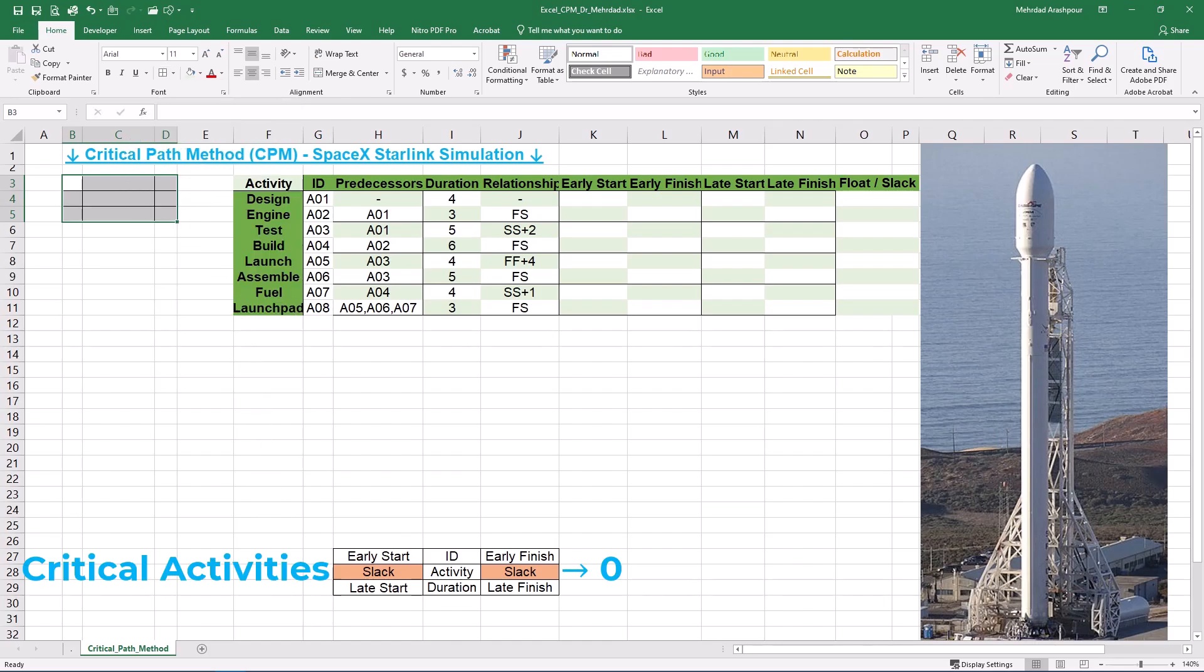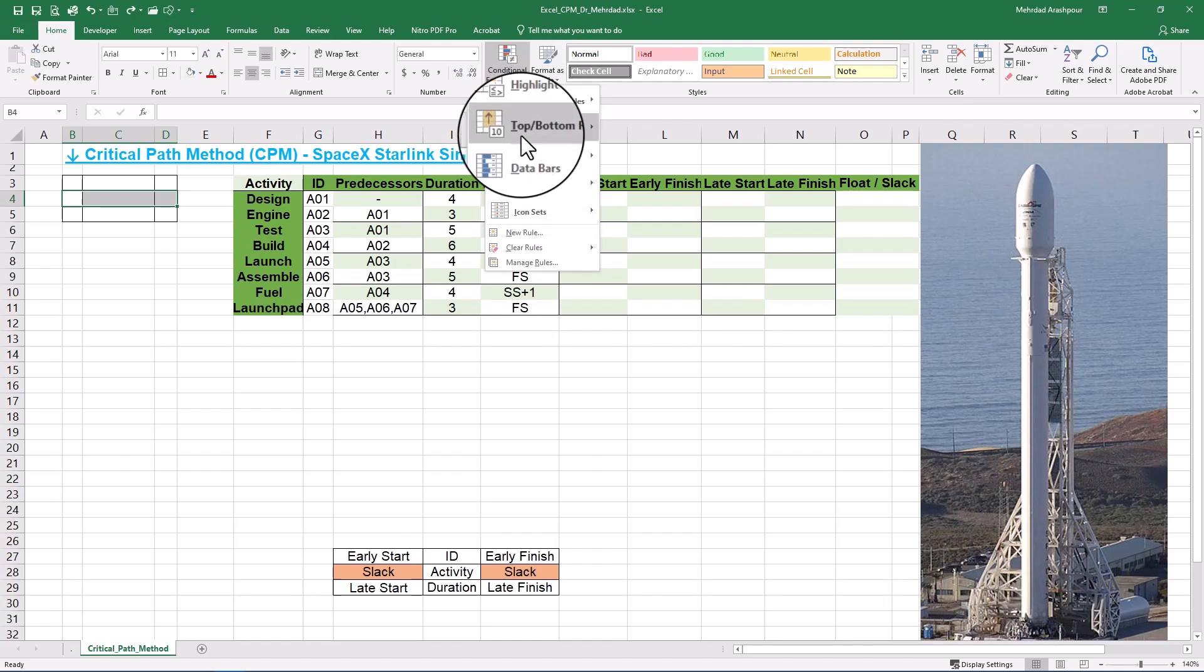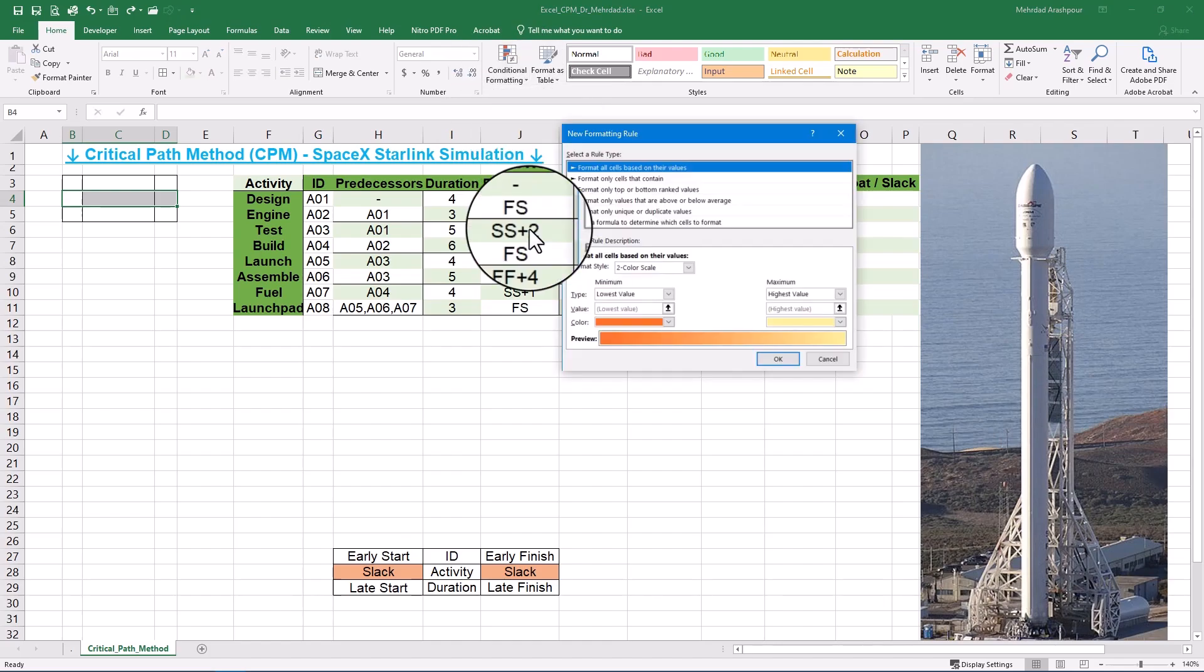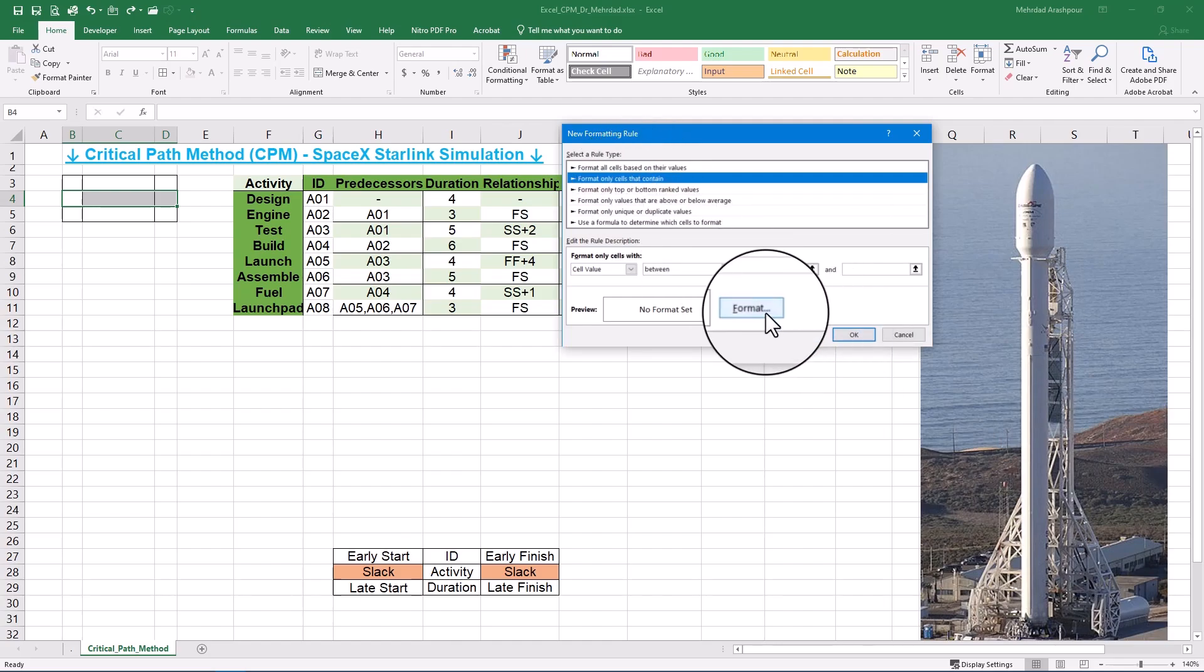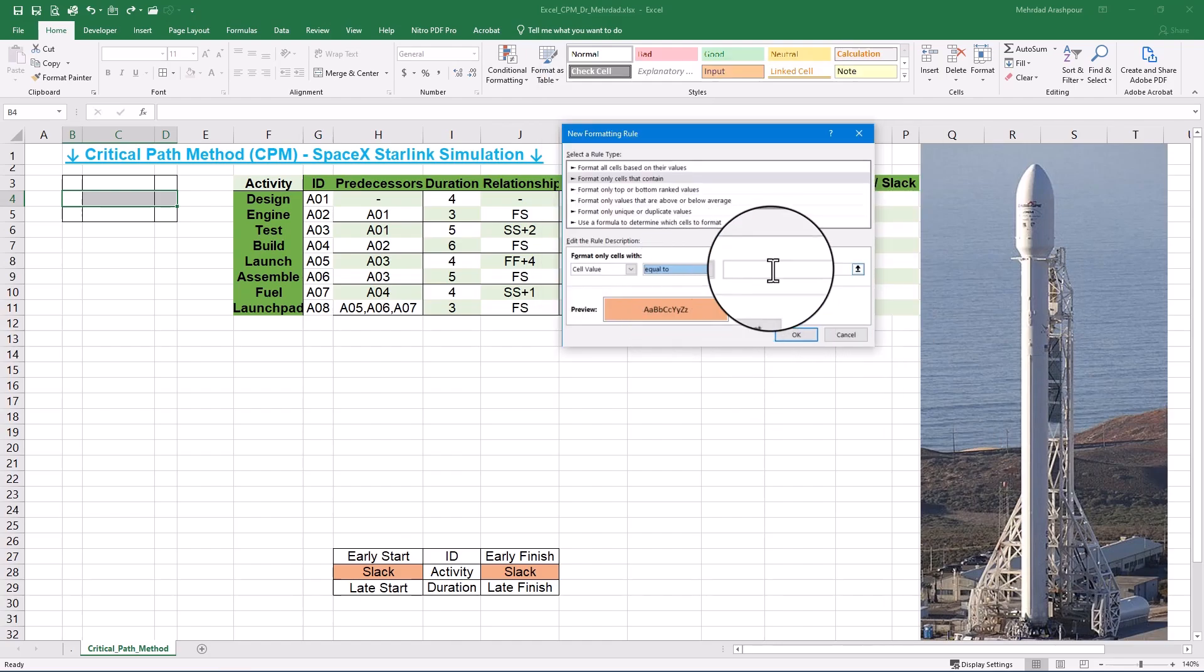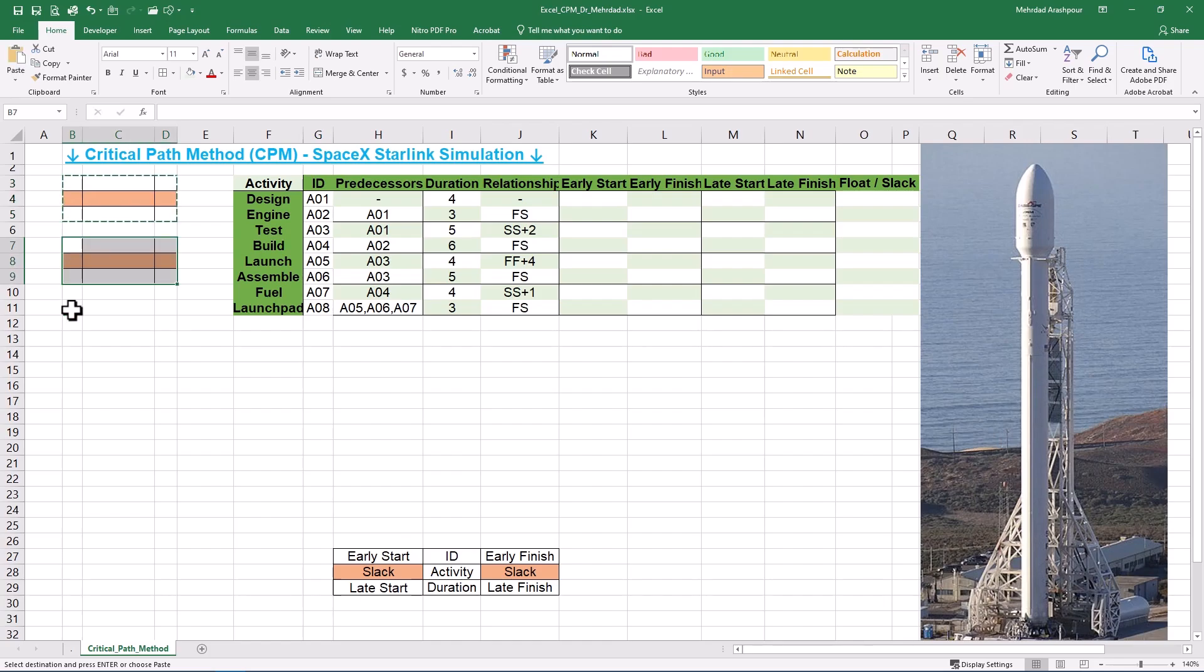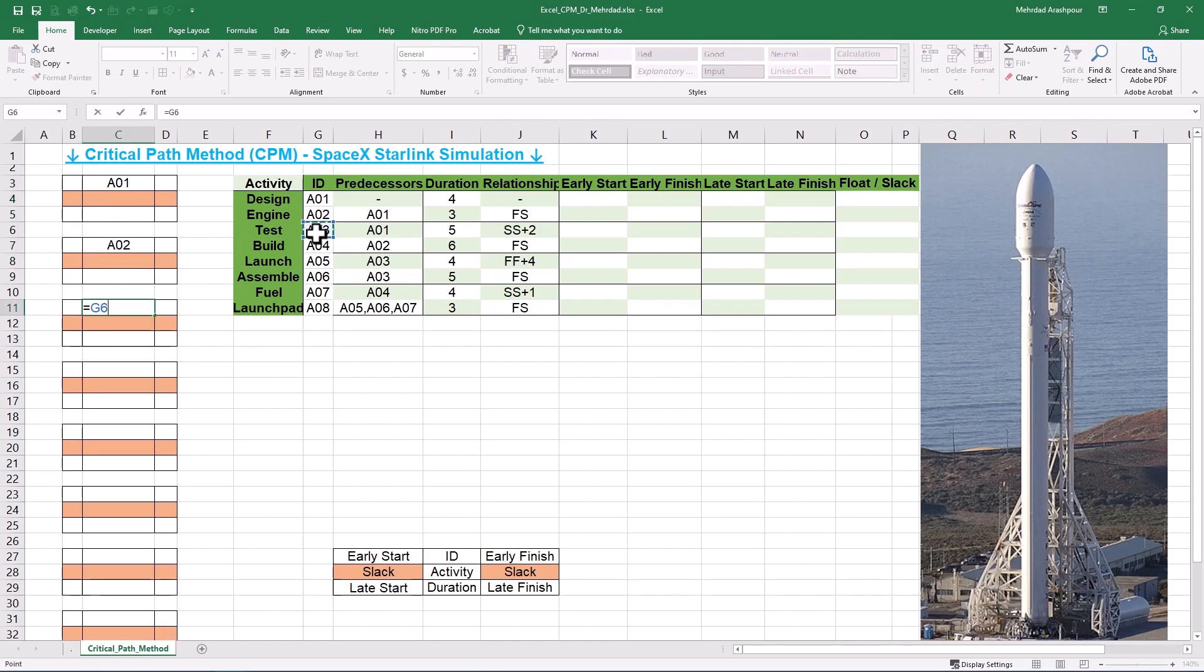Here, we want to highlight critical activities for which slack or float equals 0. We should select the middle row of activity block and navigate to Conditional Formatting. From the list, select New Rule and then select the second option, which is Format only cells that contain. We need to color code the cells with an appropriate background color when the activity slack value equals 0. Now, we can copy paste activity block for other project tasks and fill out the ID cell based on our template.